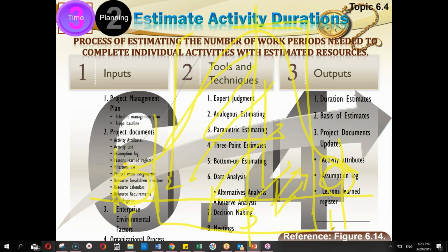So probably calculations can give me a lot of advantage. This 1.5, not only that, I have built in a margin of 0.83 days in my estimate, but I also know that if this thing is going to be further delayed, how much delayed it will be. One deviation means add 1.5 days. 2 deviation delay means add another 1.5 days, and 3 deviations add another 1.5 days. So this is the maximum you can go.